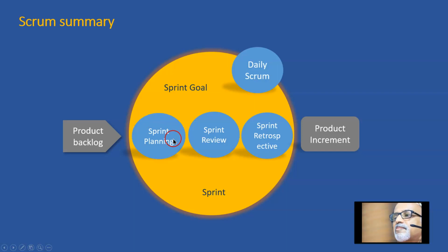During the sprint planning meeting, he proposes a set of features to be developed. The team clarifies everything, estimates it, decomposes it into tasks, and they decide how to convert that into the final deliverable.